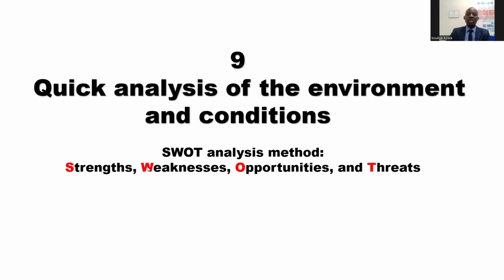So let's say my project is somewhere in Nigeria. I'm going to try to understand that specific region. What are the strengths? What are the opportunities in that area that will allow me to be successful? And what are the weaknesses? What are some of the threats? Do they have bad roads? Do they have security issues? And how are those going to impact my project? That's a macro level, but at the lowest level, you can also run this type of analysis. If you are doing your project in a specific city or even with your family, you can just apply this method and see what your chances of success are.